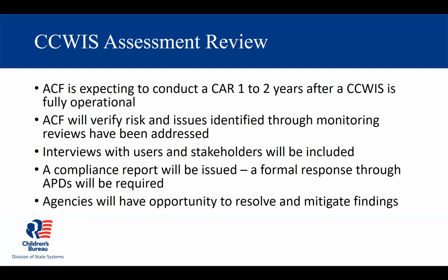While we're still working on some of the details for the CAR process, we do anticipate conducting a formal compliance review no earlier than 1 to 2 years after a CCWIS is fully operational. Because we've done monitoring reviews in advance, we will try to focus on risks and issues identified in the self-assessments or previous monitoring reviews as a launching point. But again, as I just mentioned, with an overall focus on the cohesion and integration of the different modules. We will issue a formal report, unlike with the monitoring reviews, and responses will be addressed by agencies through the APD process. Next slide, please.